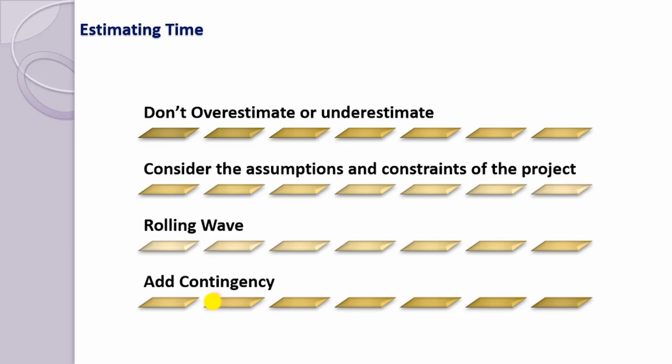So the traditional method has always been to estimate tasks, factor in dependency, and identify where you have inherent contingency. Inherent contingency arises when you have one task that relies on another, and unavoidable time in between the two.